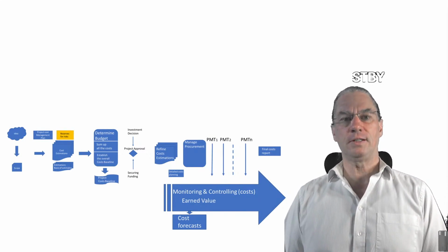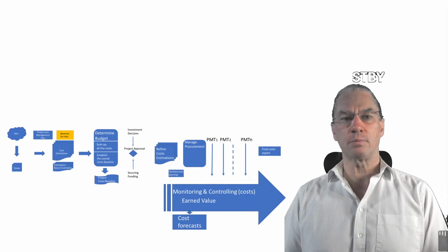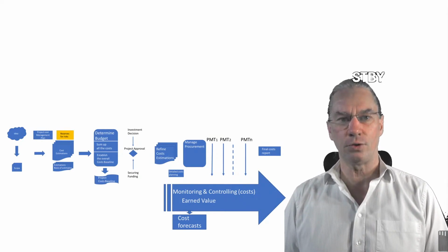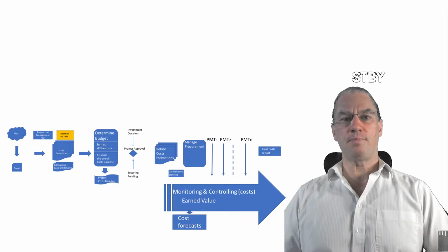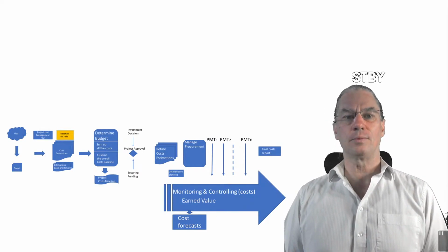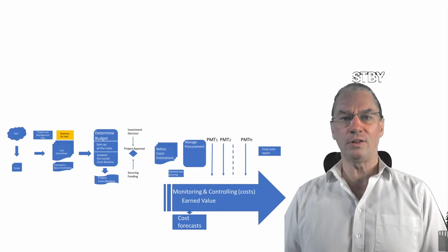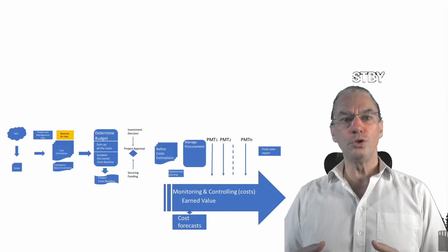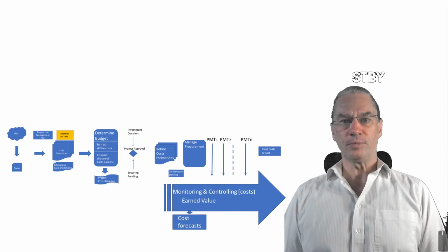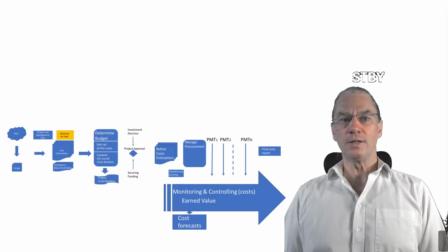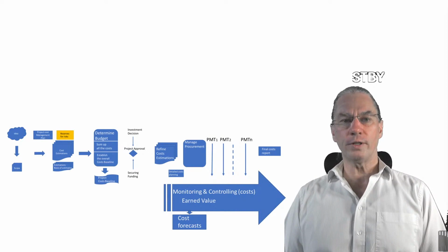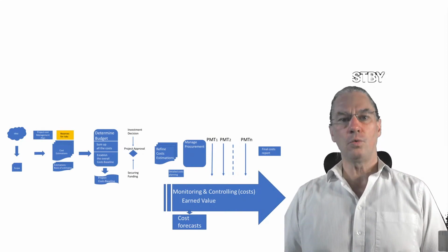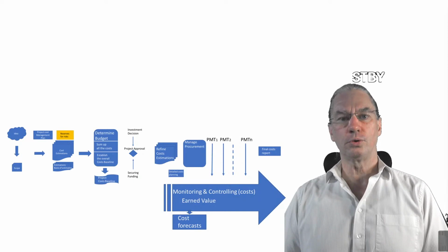We mustn't forget that a project is an investment for a company or an organization, so something is expected out of this project. In the case of an investment, it can be, for example, a new production line, and you expect to be able to produce new products. So in the final report, it's good to say what the project has brought to the company in terms of investment.